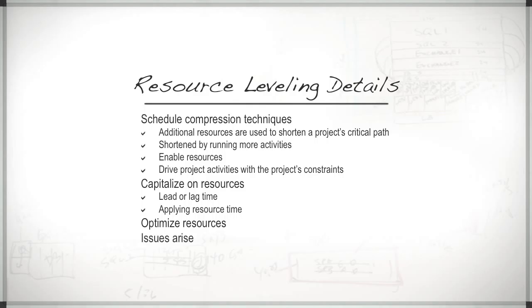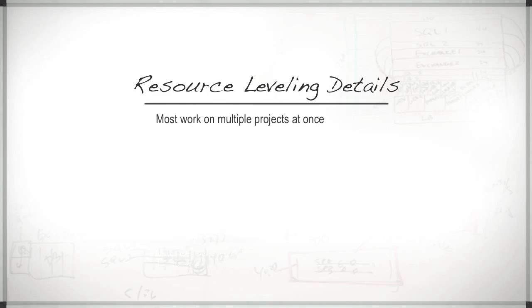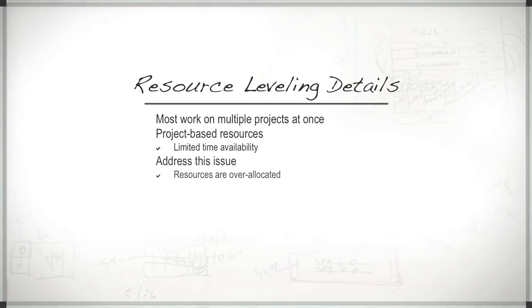Resource leveling issues arise when subject matter experts or key resources are available on a limited basis. Unfortunately for the project managers, most tend to work multiple projects at one time. The same holds true for project-based resources, so their availability may be limited at times. Resource leveling helps address this issue and is necessary when resources are overallocated. Resource leveling can have an impact on a project's critical path.